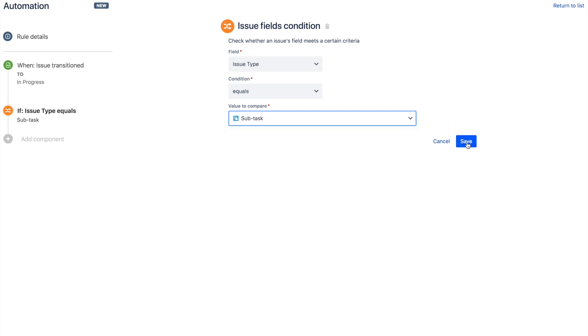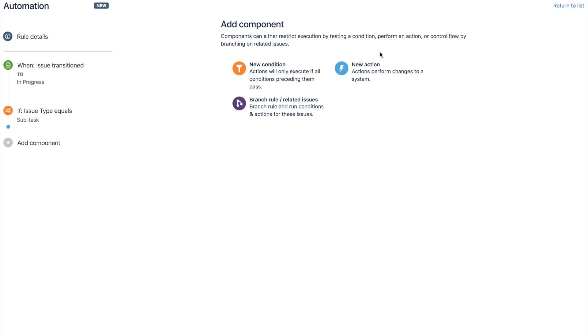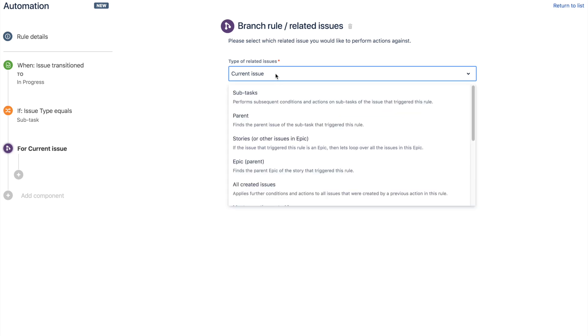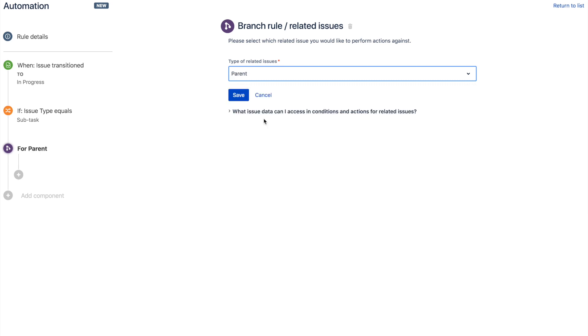Now, what we want to do is actually work on the parent of those subtasks. So we choose the branch rule slash related issues, which means we can go off and work on related issues. And in here, we'll choose parents. So now we're working on the parent of that trigger issue.